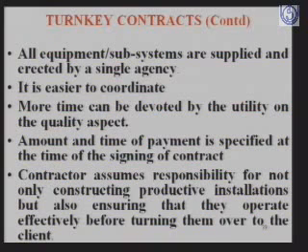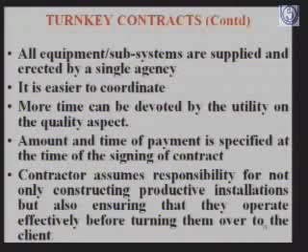The contractor assumes responsibility for not only constructing productive installations, but also ensuring that they operate effectively before turning them over to the client. It means that after he has erected and completed it, he does the test runs, starts operation and sees that they operate satisfactorily before the plant is handed over to the utility which has awarded the contract to the turnkey contractor.